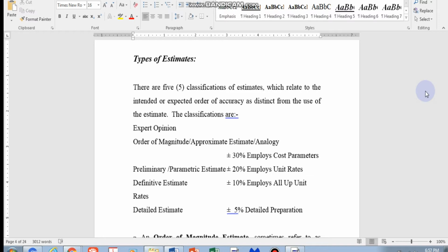For example, say the concrete part of this particular project is 250 ringgit per meter cube, or 300 ringgit per meter cube for grade 25, plus pouring at 30 ringgit per meter cube, plus labor and machineries, maybe 60 ringgit per meter cube, plus subcontractor, supervision, everything. So you actually have a 700 per meter cube kind of rate, or 650, or 550 per meter cube.